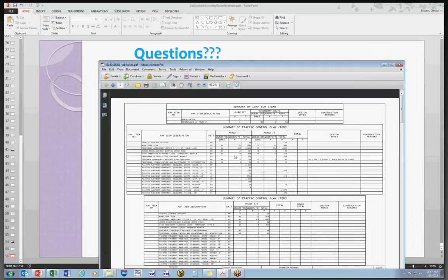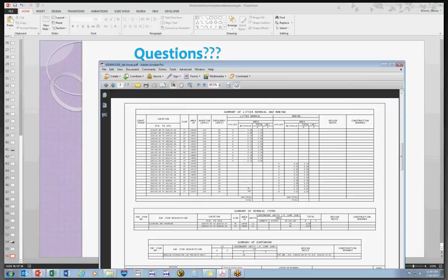What I would do is leave phase 1 in here like it is. Delete phase 2, because I understand where you're coming from. I do. Delete phase 2, but leave this grand total blank. Okay, so you show the total for phase 1, but you don't show the total on the other one. Got it. Don't show it as a grand total. And when it comes to like the clear litter removal and mowing, what about litter removal and mowing? When you only have one.